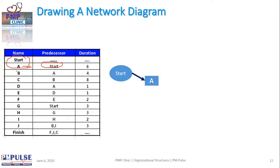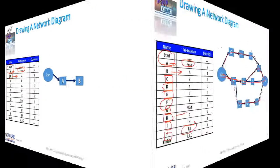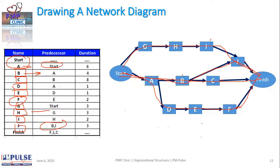There's another activity called B, and B actually happens after A because B's predecessor is A. It means that immediately after A you would have another node called B. So we've started making the network diagram. That's how an entire network diagram is made.